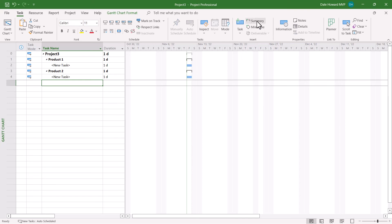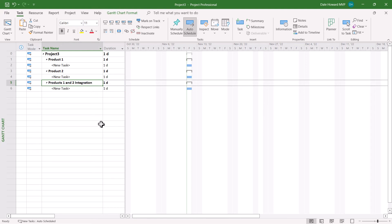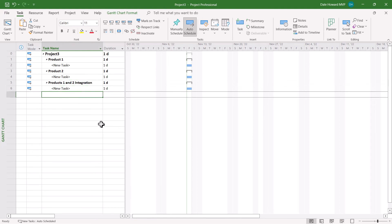Then continue the process of clicking Insert Summary Task, out-denting the task, and giving the summary task a name.